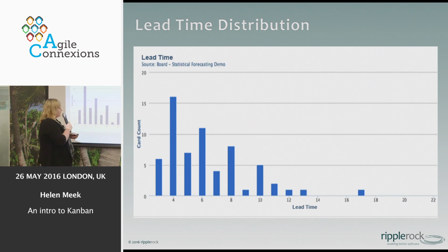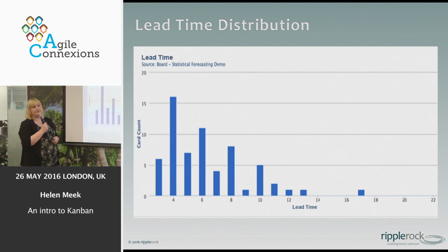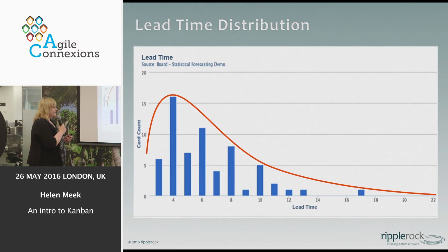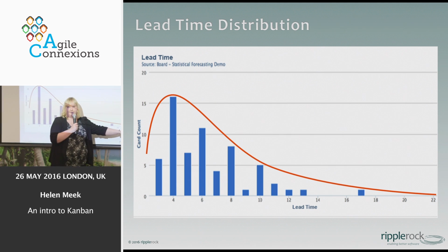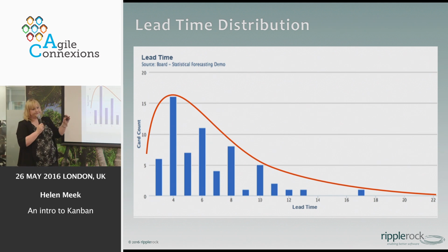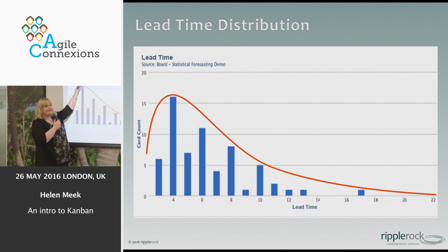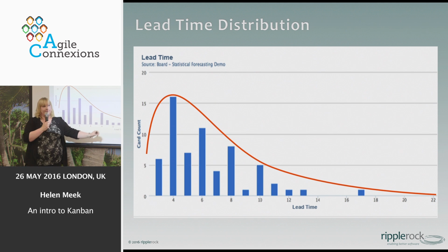So with this, Troy tells me that pretty much all of the time, we don't see a bell curve distribution on this. What we actually see is something called a Weibull distribution, W-E-I-B-U-L-L, okay? And that means, in my world, it's big up here, and then it tails off at the end, okay? And interestingly, one of my teams working with ASOS at the moment, I plugged in their data, had no idea what it was going to look like, and it actually did look like a Weibull distribution, so I have validated his work, years of it.